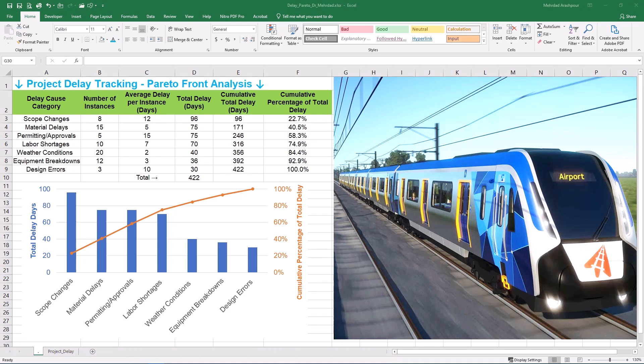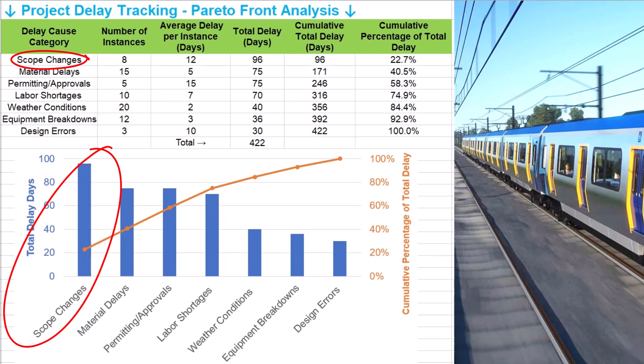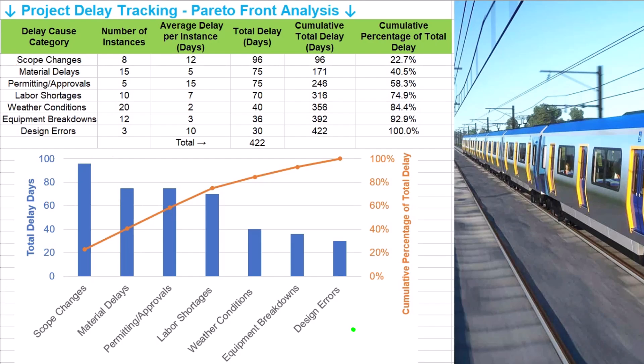So where does Pareto analysis fit in? Pareto analysis is a cause-tracking and prioritization method. Its strengths are its simplicity, visual power to communicate the relative contribution of different causes, and its focus on strategic decision making. Think of Pareto analysis as the primary step — it helps you quickly identify what to investigate further. For example, once you know scope changes are a major cause, you might then use TIA or window analysis to quantify the specific delay impact and assign responsibility. Pareto analysis is your strategy compass, showing you where the analytical deep dive needs to begin, and it's a fantastic tool for understanding the bigger picture of delay causes and prioritizing improvement efforts.